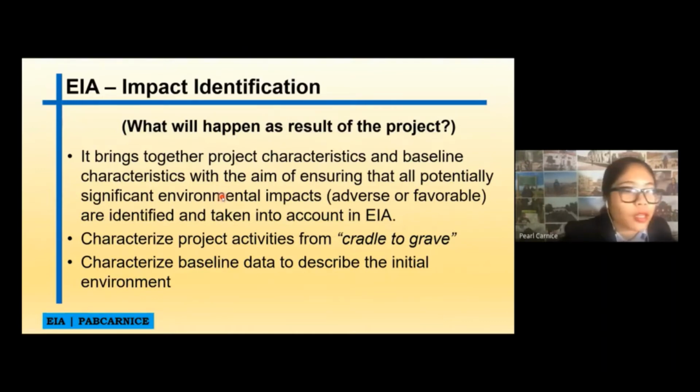because this will be the main meat of your EIA study. If you will not be able to identify all the impacts, all the adverse impacts or high risk impacts of your project, there is a huge possibility that your application will be denied. And if your application will be denied, then that will be hard, because you have to maybe redo your EIA study, or you can add up the missing impacts that you were not able to identify in your EIS study.